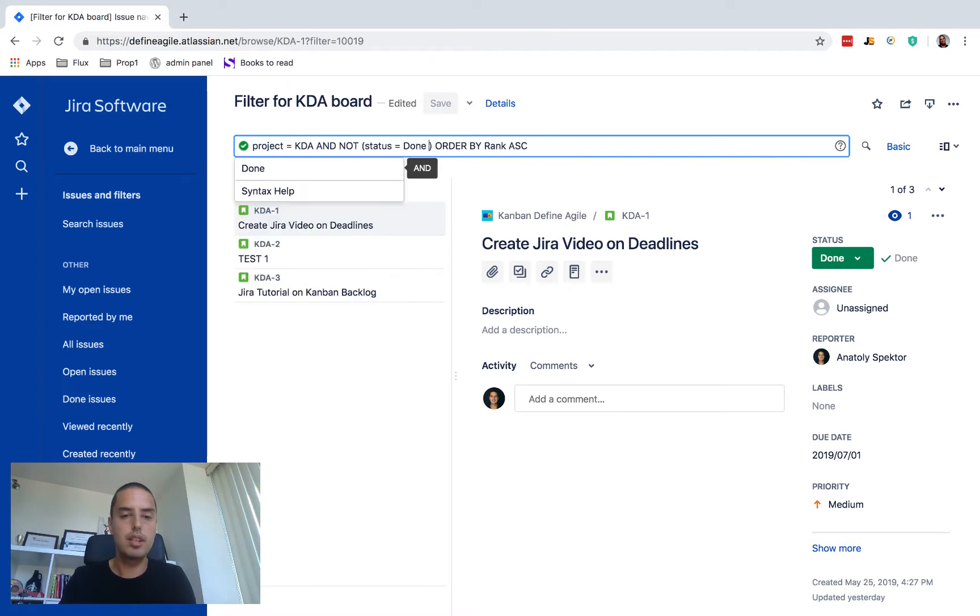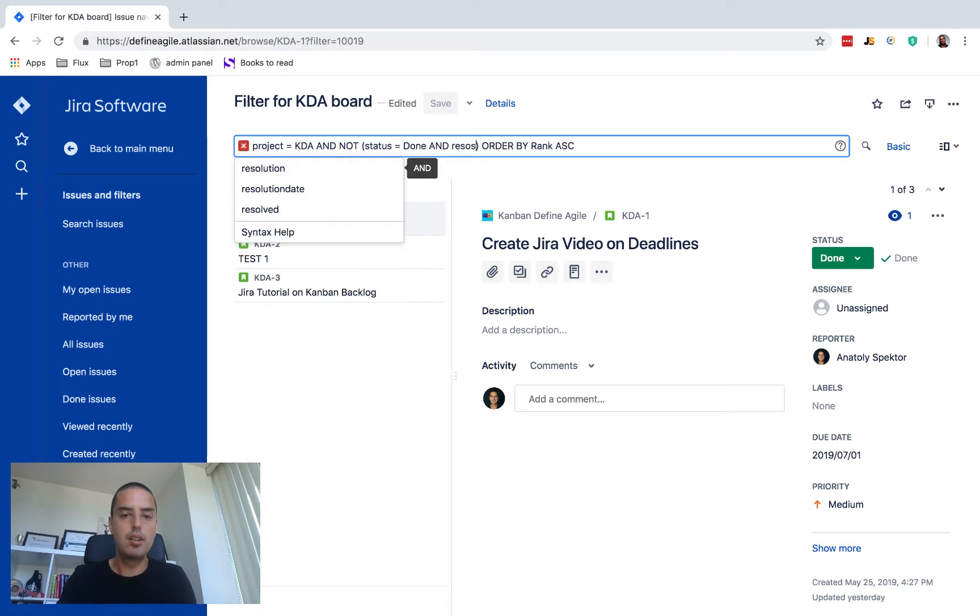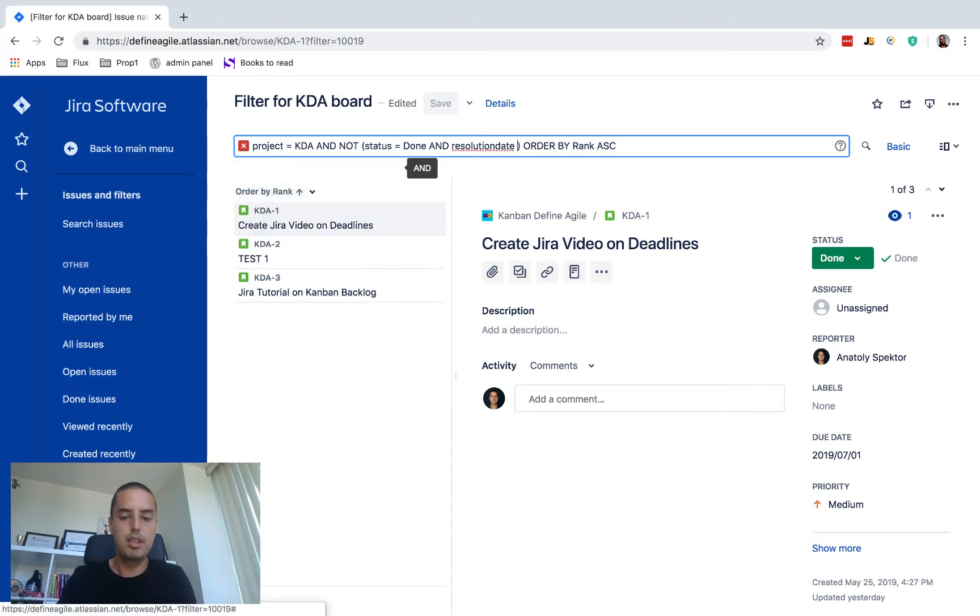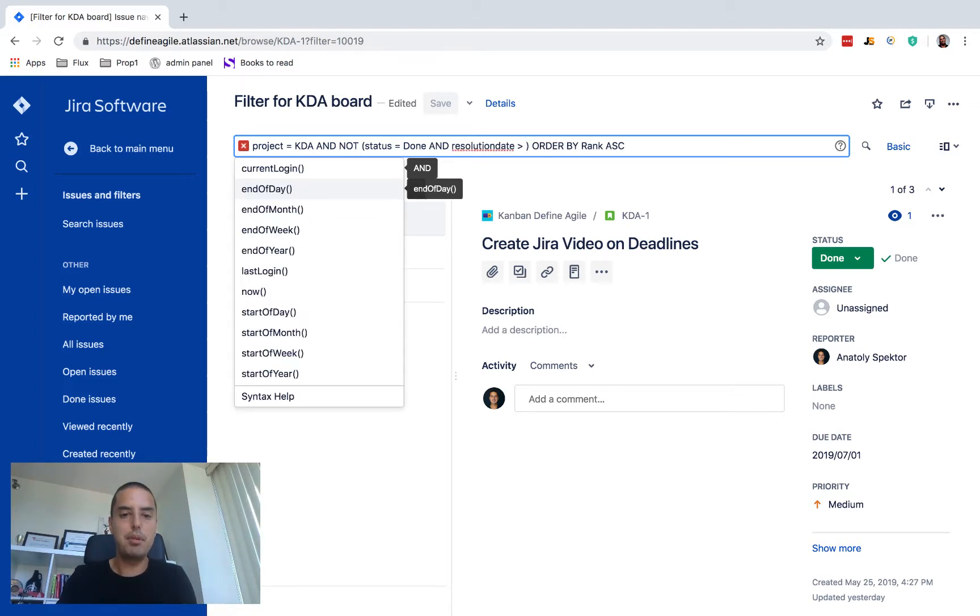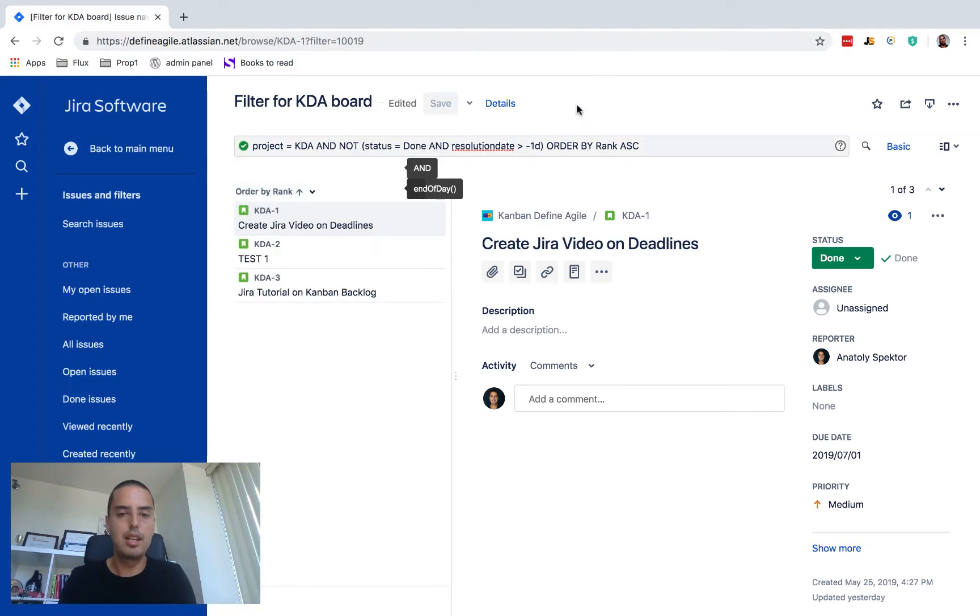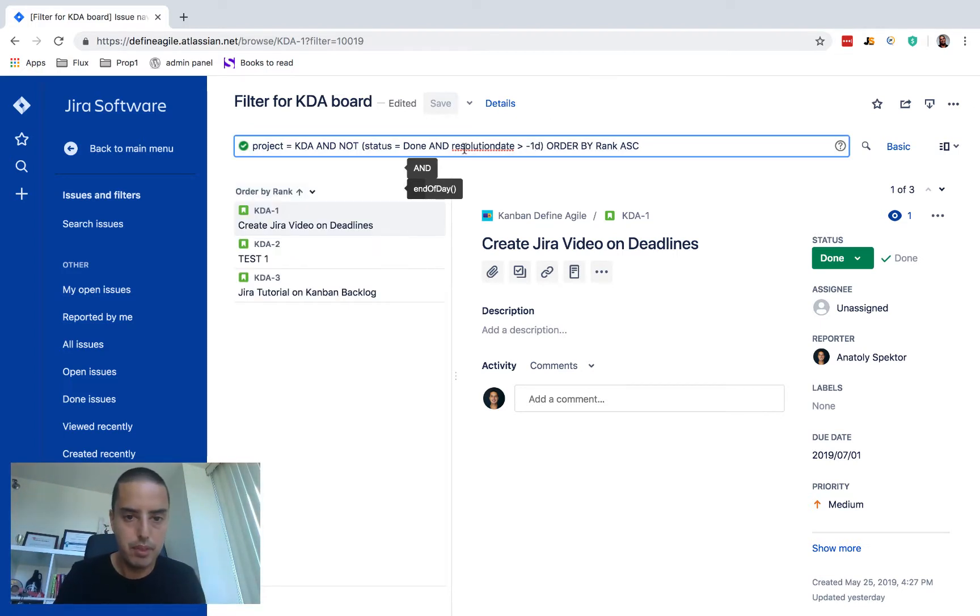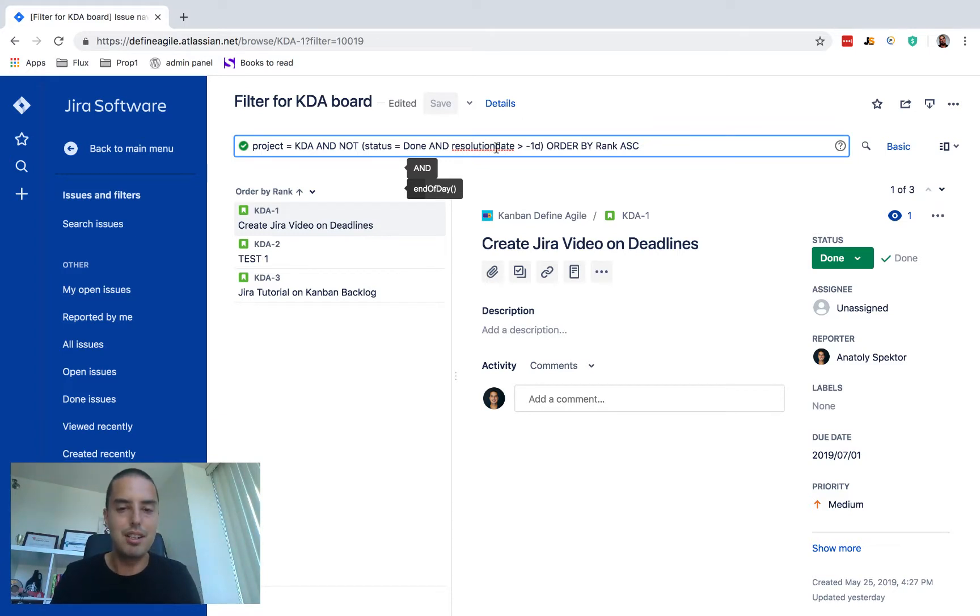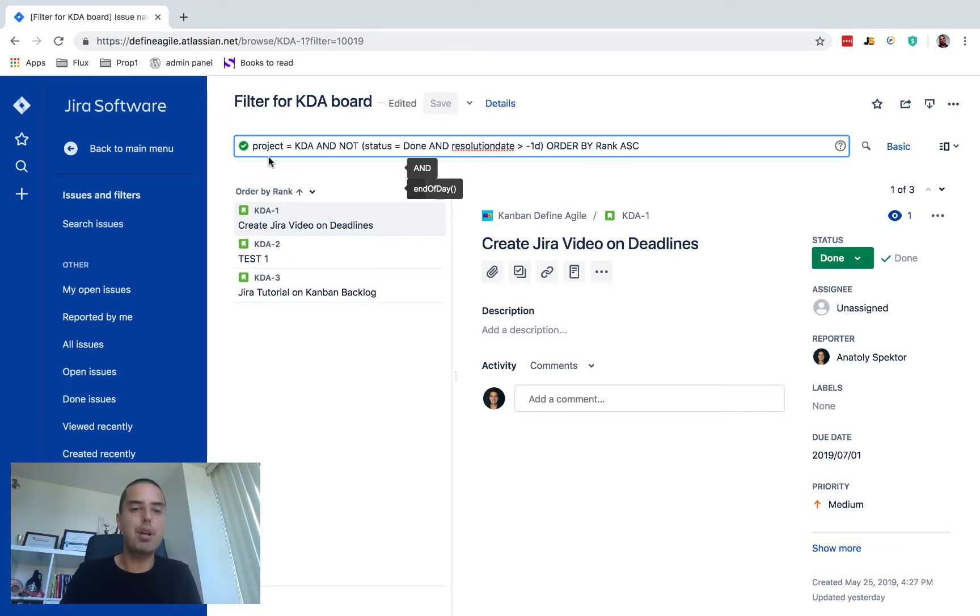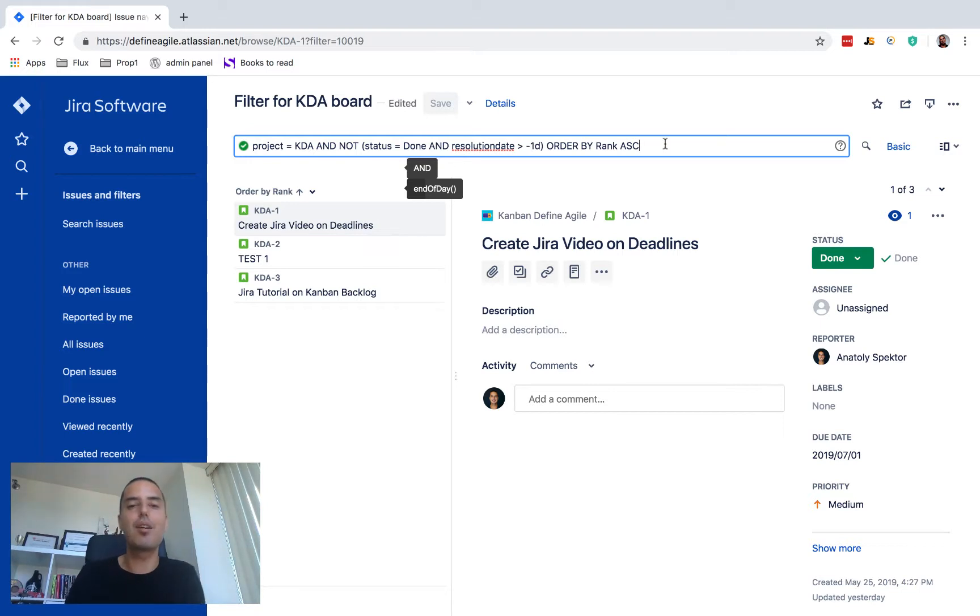So to do multiple things at the same time, in math we use brackets, so we do the same thing here. And now we say status equals done, and resolution date is more, and then here we just say minus one day. So this is highlighted because my grammar check doesn't like it but it seems to be fine.